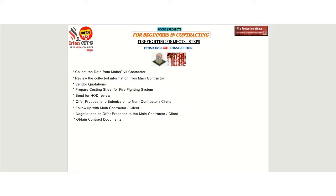As a ninth step, get the contract documents and go through each and every point or clause, and finalize the contractual terms with the main contractor or client. Then start preparing material submittals, shop drawings, and calculations in line with the project technical specifications.